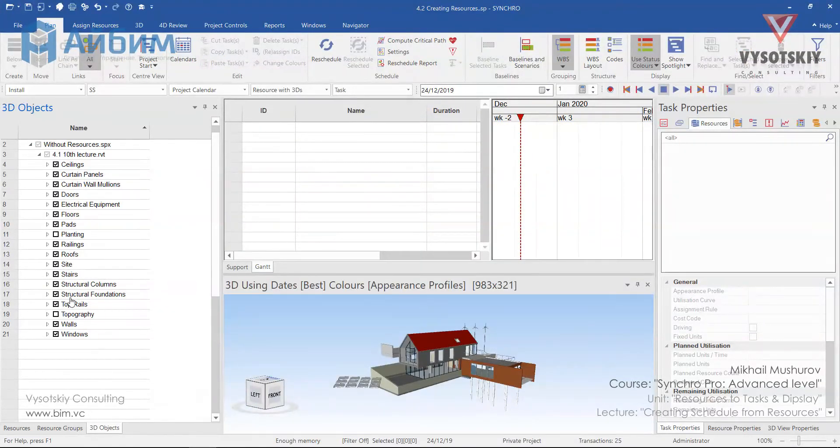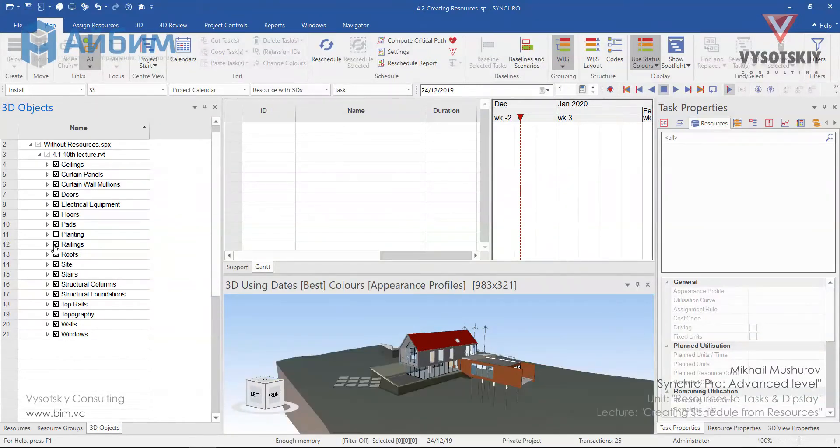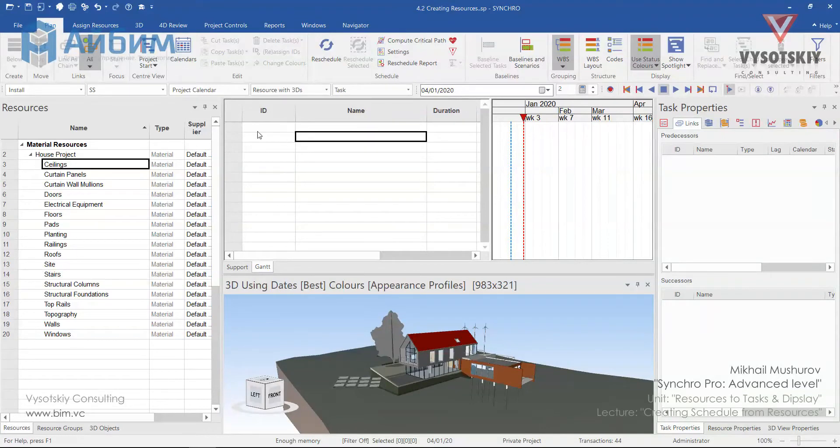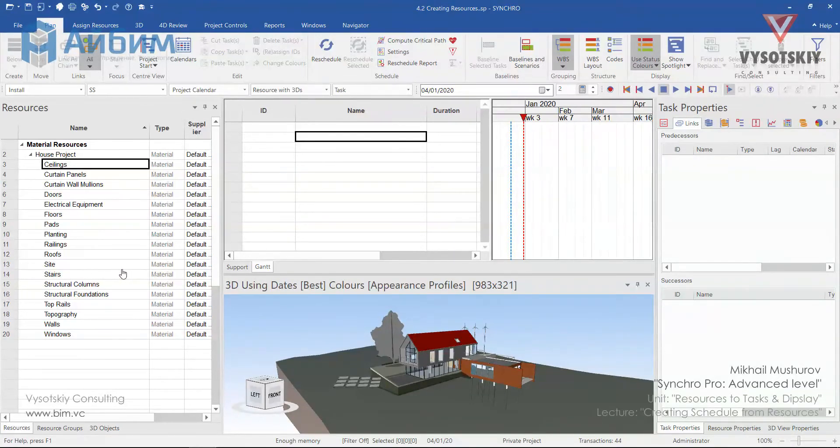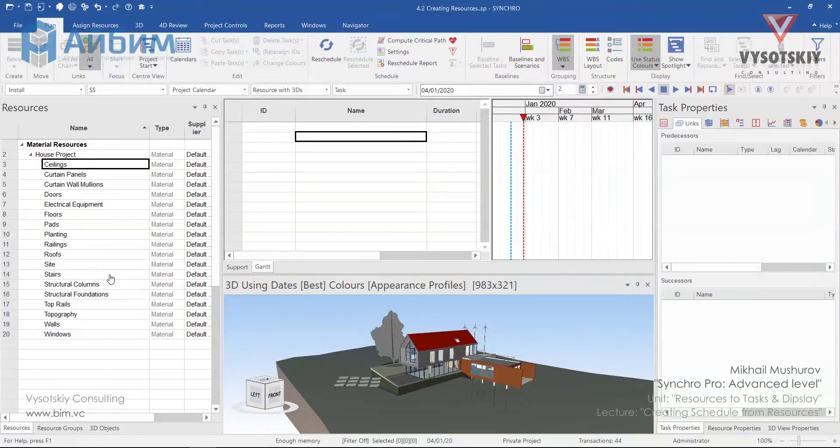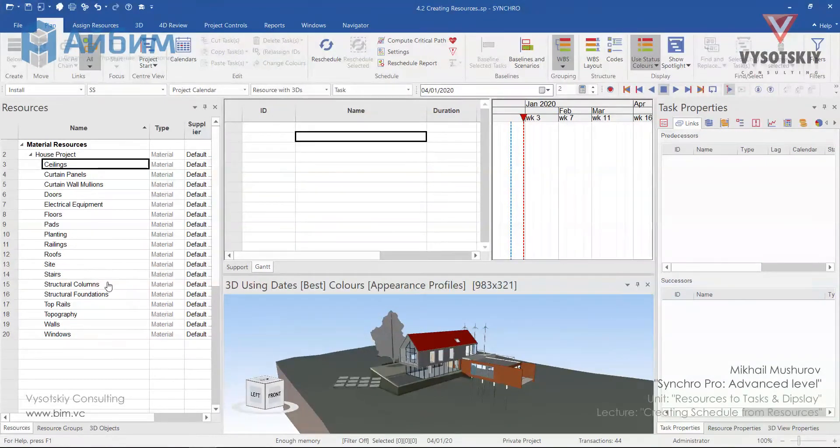First of all, let's go to 3D objects and activate topography and planting. For structural elements like foundations, slabs, walls and so on, we can apply gravity method. The sequence we select resources is important here. We will select resources in the order that we preferred construction will be.